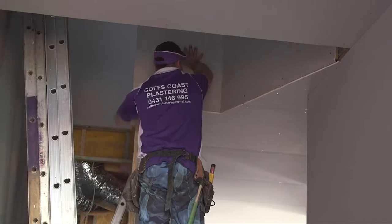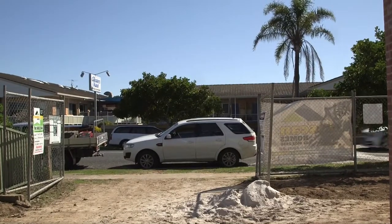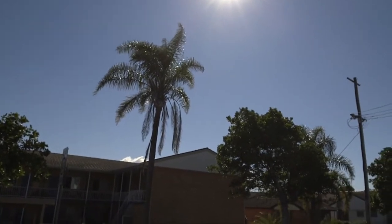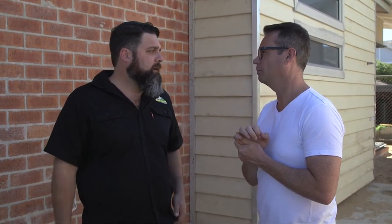We've got water retention pods to go in the ground underneath the driveway. Okay. All the stormwater from the houses actually goes to underground tanks as well, and then it goes to a retention system before it goes out to the street. All right, so I guess you've got to sort all that before you can do any landscaping then. Yeah, we've got 4 underground tanks, and we've got about 25 lineal metres of underground pods that disperse water back into the sand.